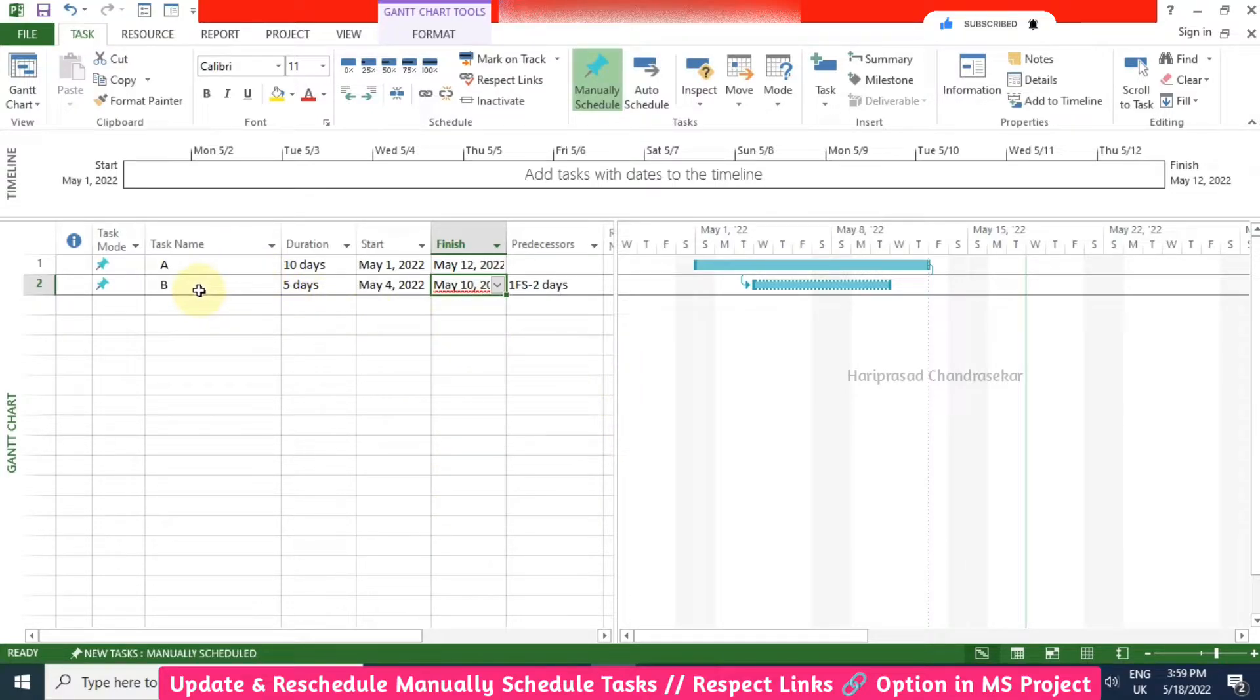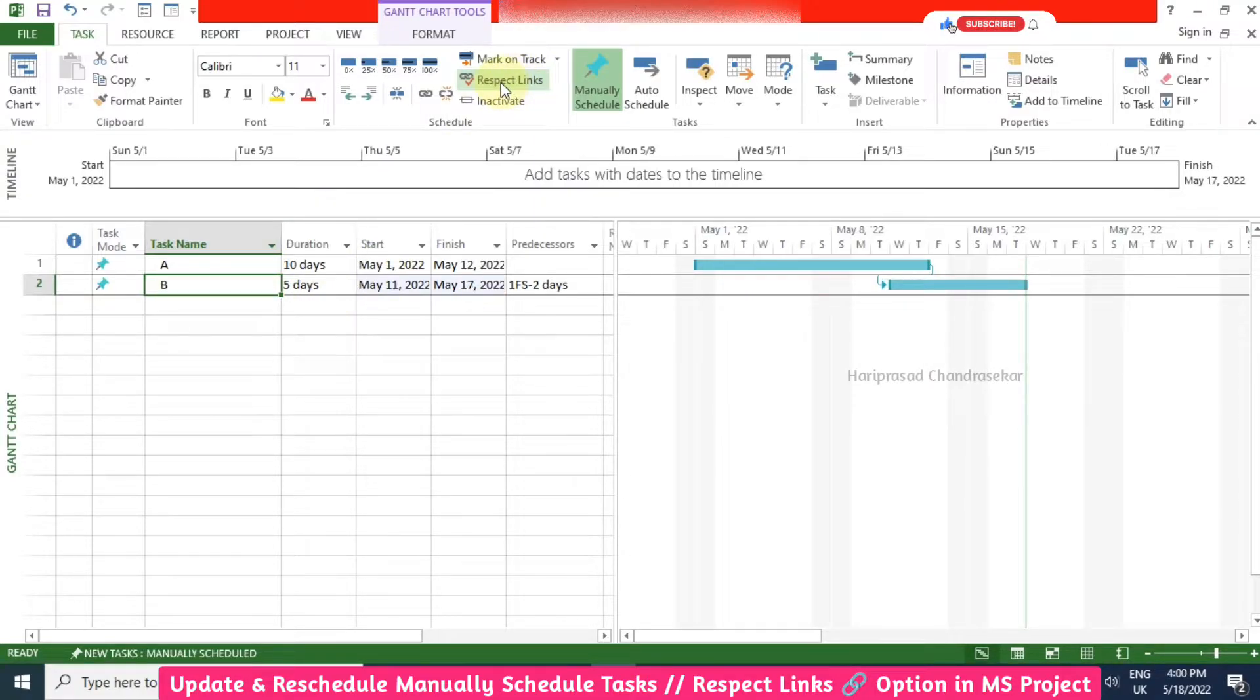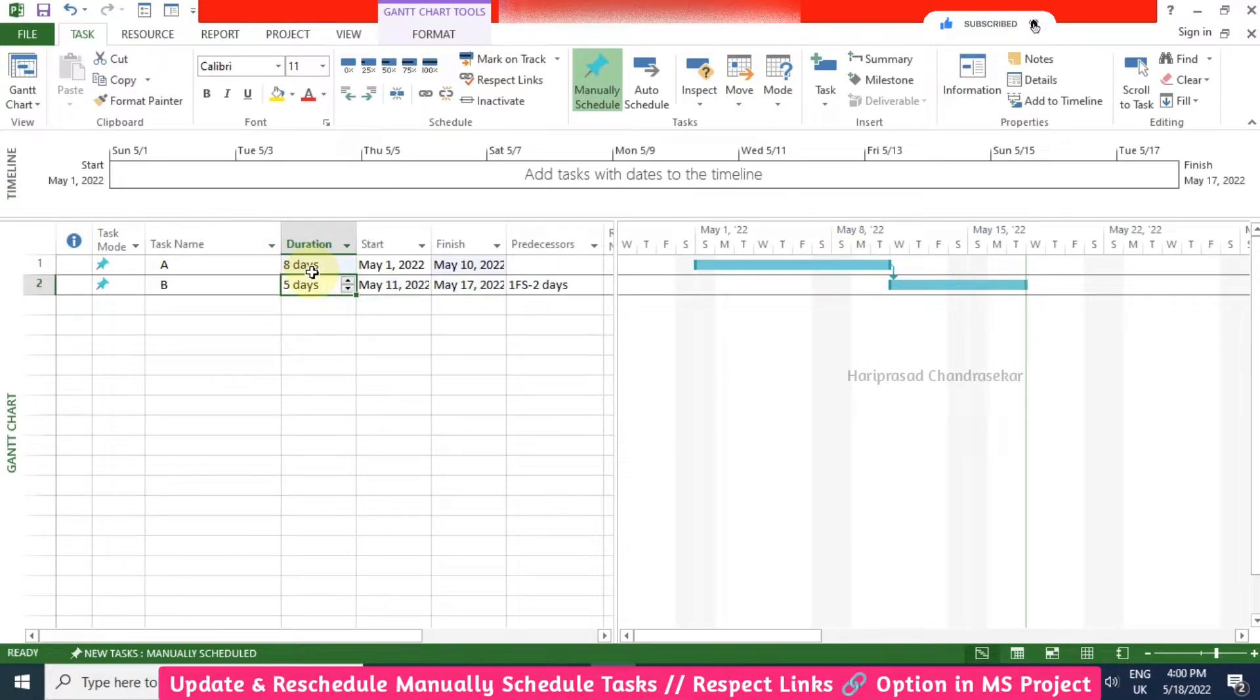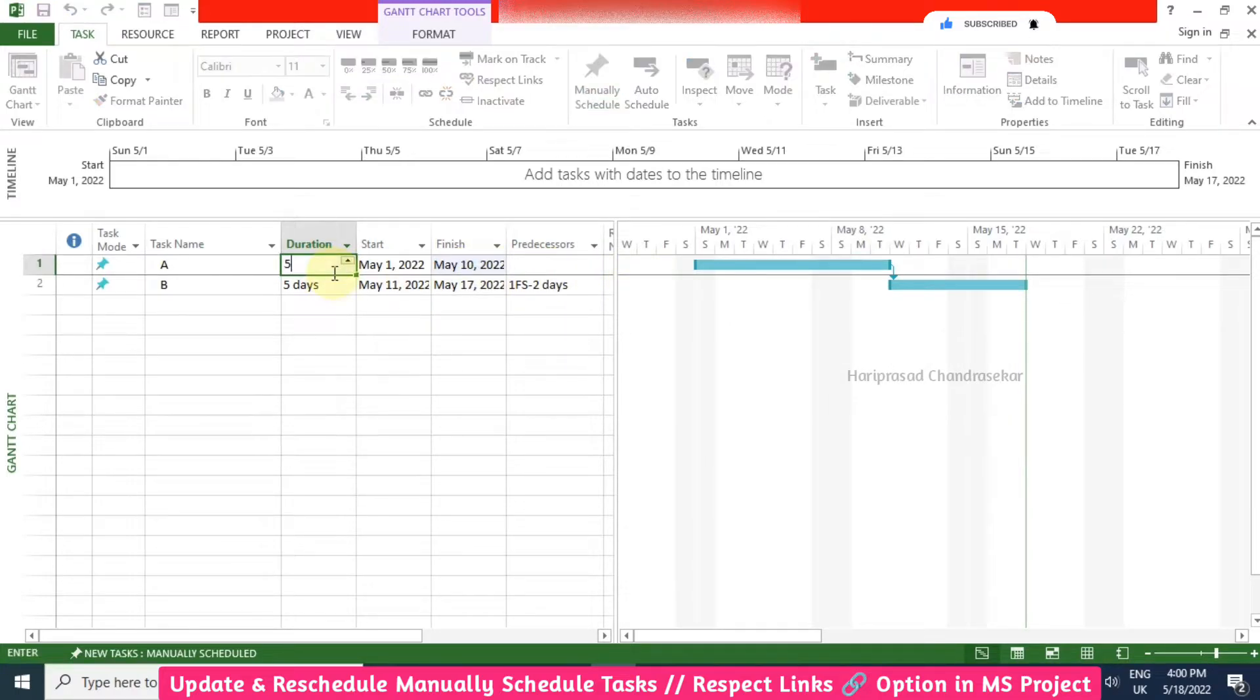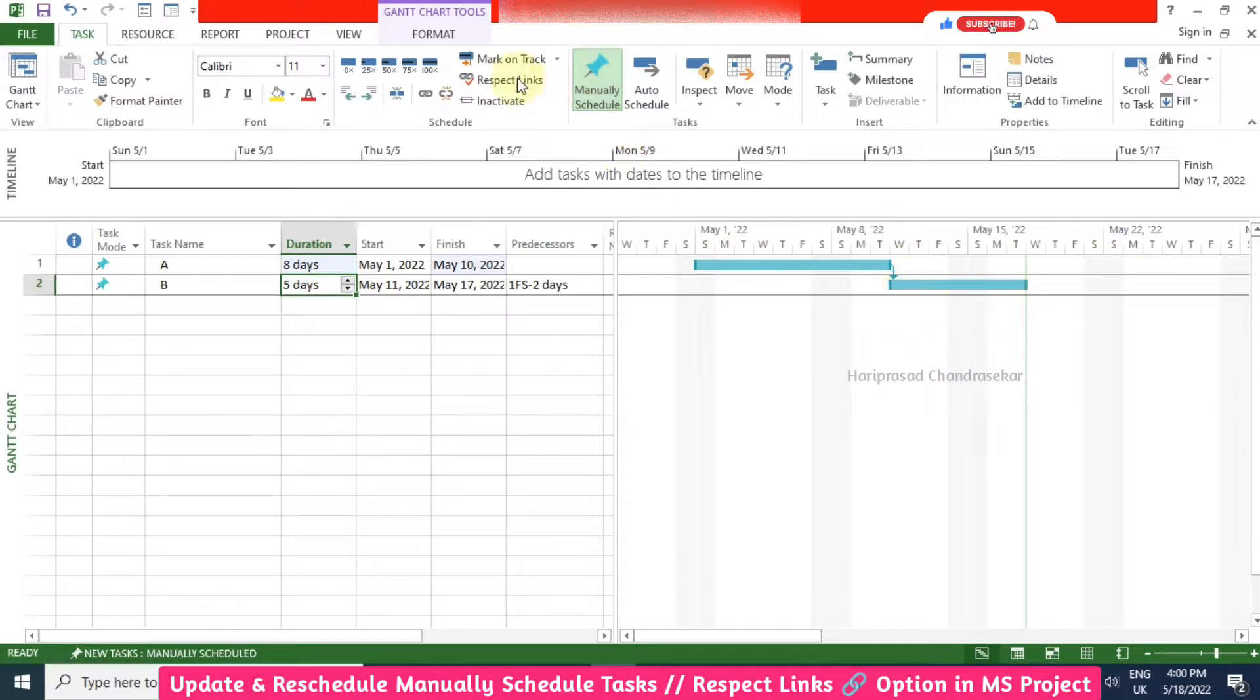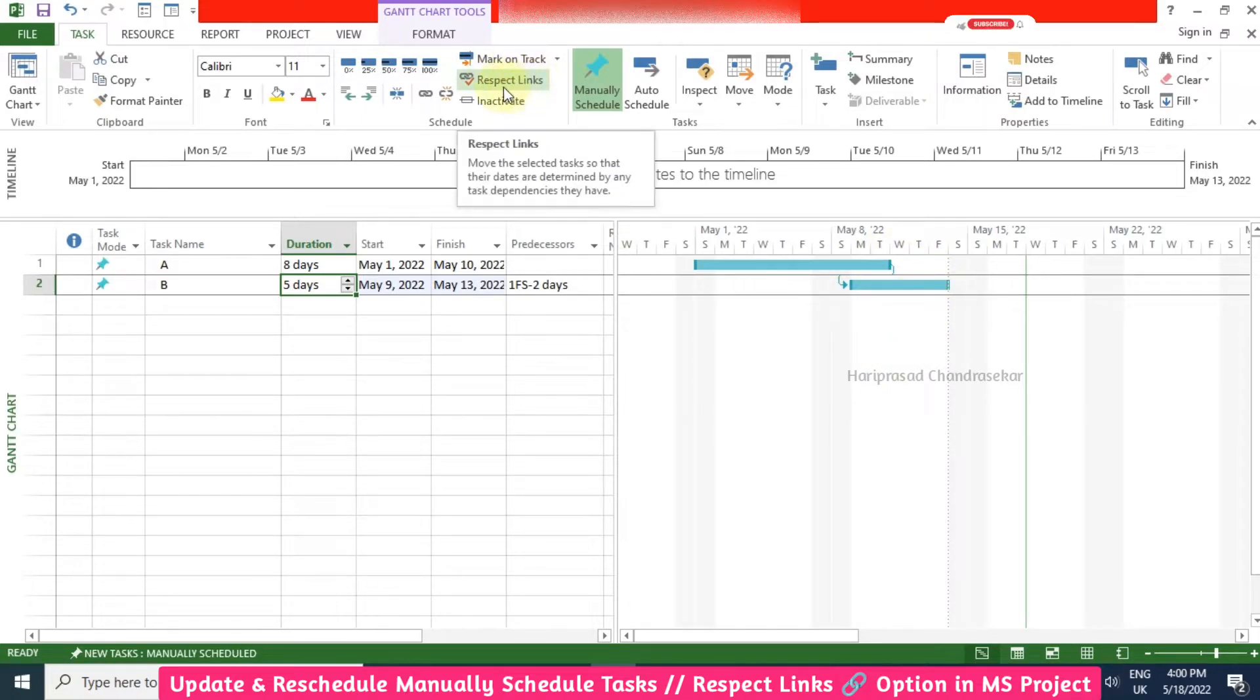Now what you can do is click this activity or task, then there is something called respect links, so then it will get updated. It is still finished to start, but there is no warning. But you need to click respect links, then only that minus 2 it will get updated. Now we can make use of this option respect links for manual schedule task.